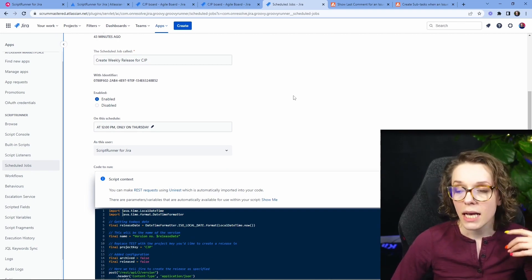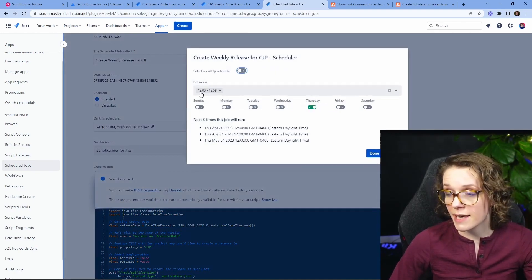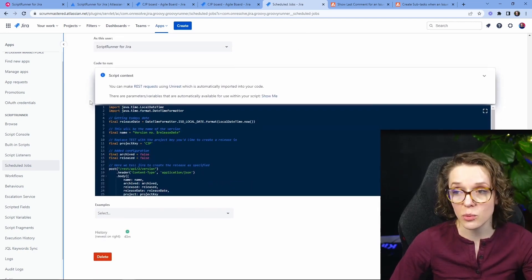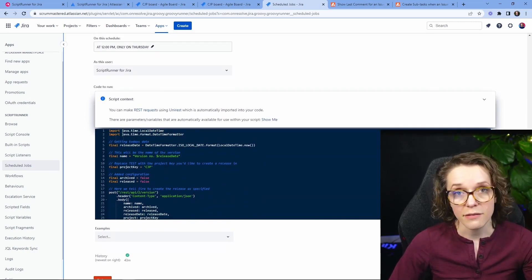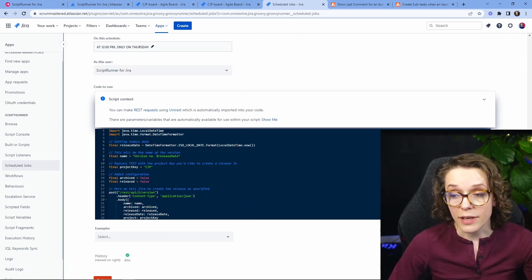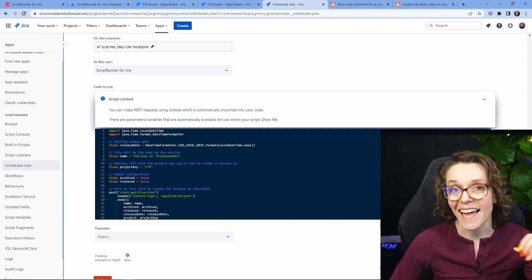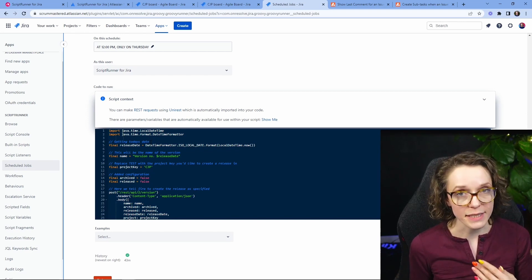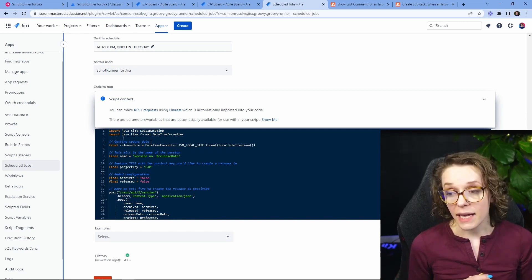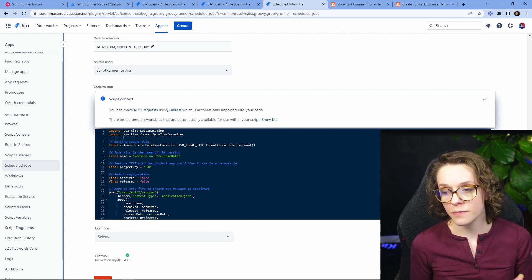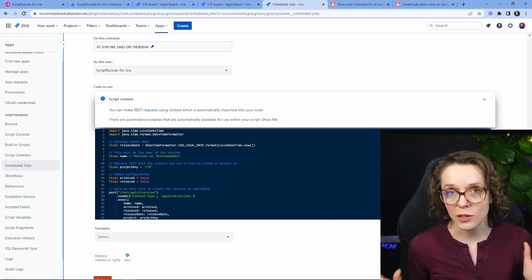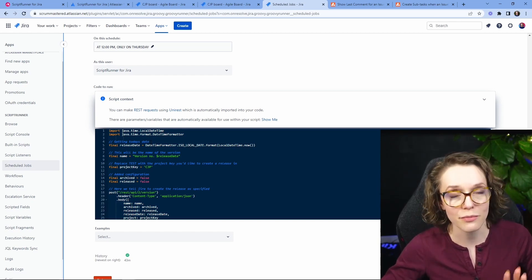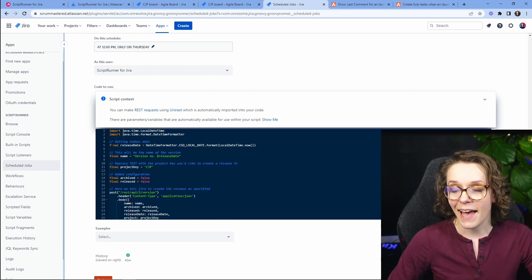And this can be a very good use case as well so this basically creates a new release in jira every single week on thursdays so I have chosen thursdays at 12 and what it will do it will just every thursday around 12 it will run the scripts like on a schedule and will create a new release slash version that can be helpful especially if your team is doing regular releases continuous deployment and we'll just recreate all of those releases for you you don't need to create them on your own.